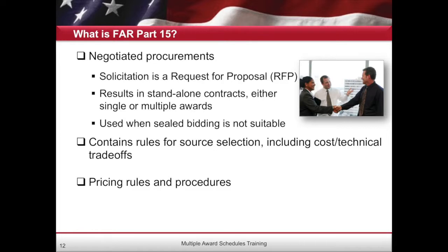All right, and so we set up all of these rules in regards to whether we're going to give cost or technical trade-offs in the evaluation of the contractors. It's a little more complex, obviously, than the schedules, and it takes time. You have to write a J&A if you're going to bypass the rules of SECA if you're using this methodology. And what I'm going to express to you is that you have to post it on FedBizOps. That's going to burn about 10 days of time. Not such a big deal. But you have to also post it under SECA.